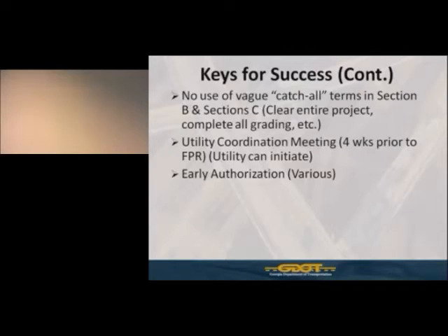But if there's possibilities for that, or there's long lead times, as I mentioned earlier, particularly with material procurement and so forth, please bring that to the district's attention so they can discuss those possibilities with the state office in order to minimize any potential delays to a project once it gets underway. So those are just, again, a brief list of some things for success for all of us to work together on. And in the end, to deliver a successful project to the traveling public for the citizens of Georgia.